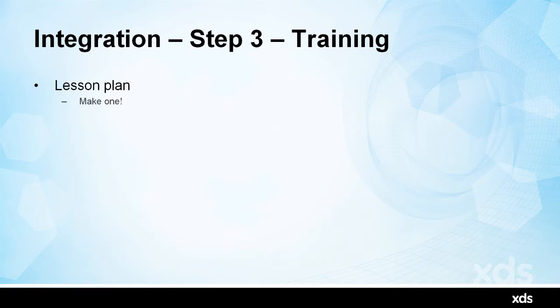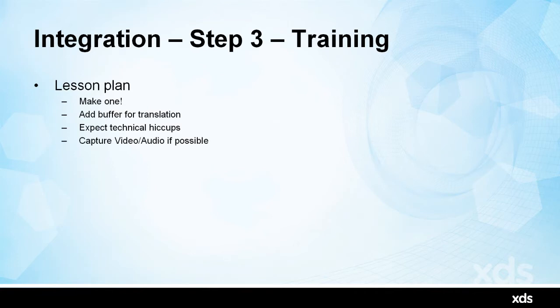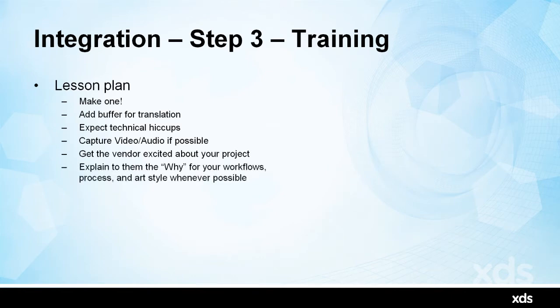Lesson plan, got to make one. Add buffer for translation, double the time. Expect technical hiccups. Capture video, audio if possible, but it can be tough sometimes to capture that. Get the vendor excited about your project. Explain the why for your workflows. So basically explain where you're coming from as much as you can, not just exactly what they're doing.